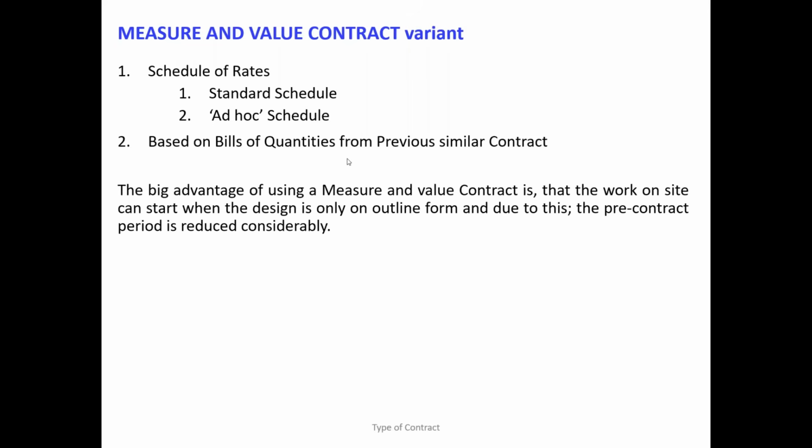So yes, concrete. What we are understanding here is, assume that in the construction industry we have around 10 different floor finishes, just for understanding. So what will happen in the standard schedule? We have not even finalized the design, so the client will include all the types of floor finishes, all the types of wall and ceiling finishes, all the types of doors, windows, everything in the standard schedule.